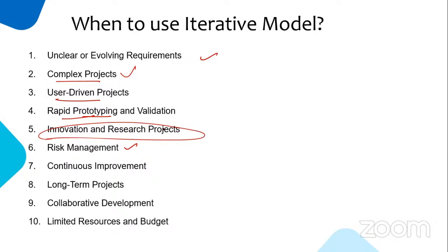For example, you are creating a medical app for physically challenged people, and the app is able to translate into voice. On a whim, you can't just go and launch a product. So you have to work with some patients, get their input, develop something and give it to them, and ask them to test it. So this is something like an iterative way. High risk management, R&D project, it's a long-term project, you can't do it just like that. It needs to be improved continuously.